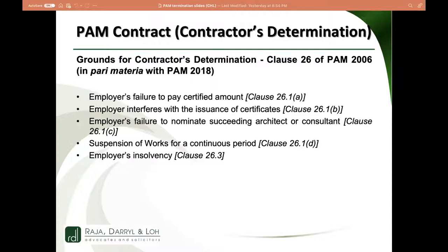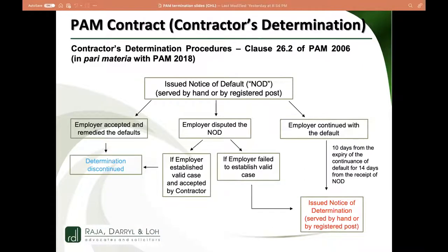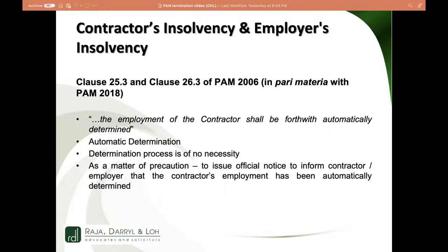The procedure for contractor's determination is almost a mirror image: you must have grounds to issue the notice of default, and if the default is not remedied, you then have the right to issue the notice of determination. In terms of contractor insolvency and employer insolvency, the difference is that for these events there is no need for the period between notice of default and determination — the determination can take place immediately, without the need to first allow the defaulting party the opportunity to remedy the default.